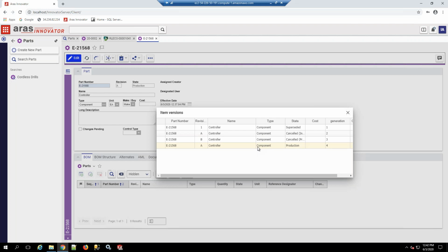And that's a huge thing, because what we find is that when people are in the middle of processing a change and they find during the process that something else needs to be added, putting it in a separate change is not ideal. That's what you would have to do out of the box, just create a separate change, and that can cause some confusion down the road. Not to mention it creates a new change, and there's a cost associated with creating new changes. So being able to add those items in work to a running process is really some nice functionality.